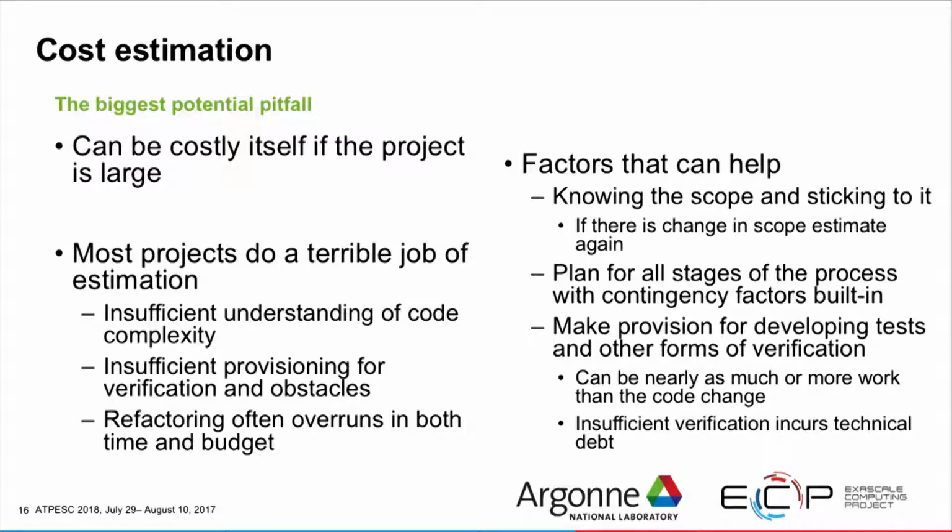However, when you have a really large project, the process of doing a cost estimation can be a very costly process in its own right. And because of that, and because of not understanding the extent of change, most projects really do a terrible job of estimation, because people may have a wrong impression about the complexity of the code, or they may not provision enough resources for verification and obstacles that may come out. And therefore, refactoring, because of these reasons, often overruns in both time and budget.